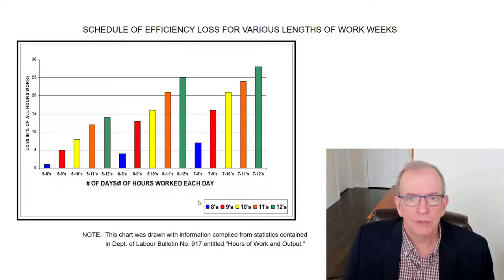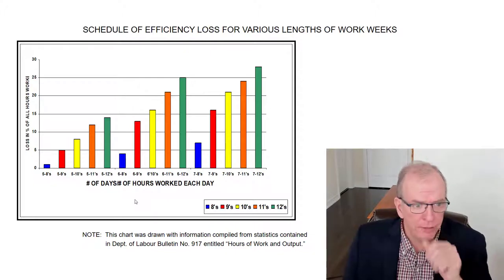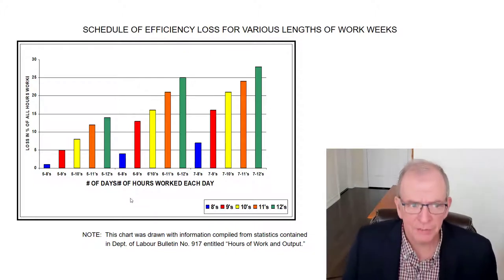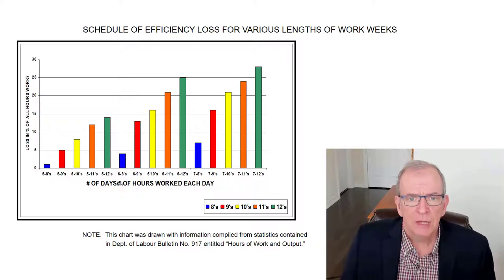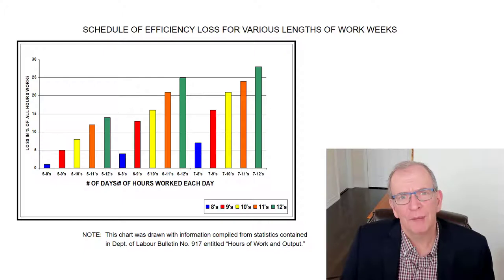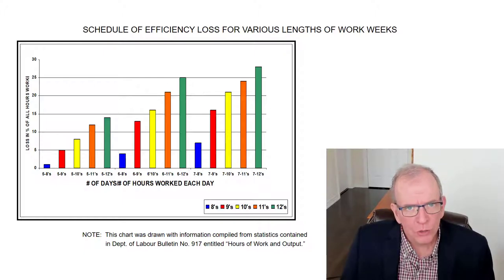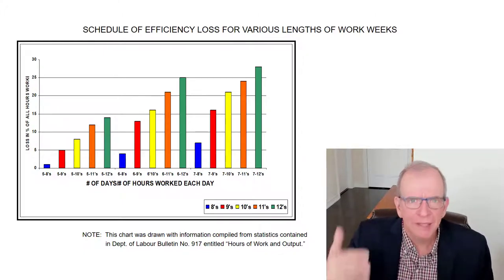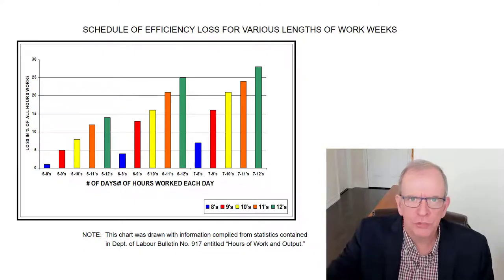out of sequence. The other thing that is very often not considered, but should be considered, is the lower productivity rates of trades when they work longer hours. Because very often when you fall behind on a project because of changes, what do you do? You work overtime, you work extra hours. And even if you price that into your change order, do you get 100% productivity out of that? What you usually would get in the normal circumstances.